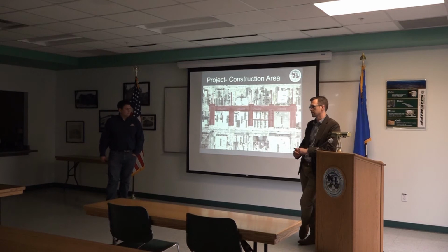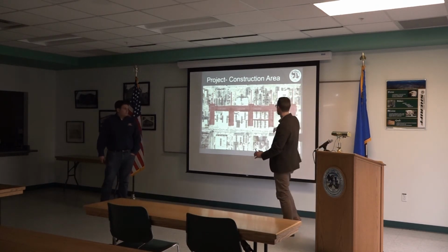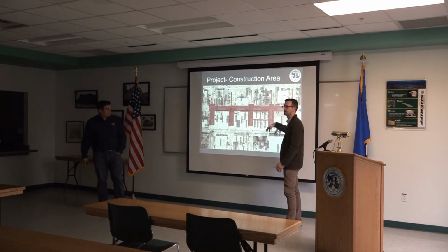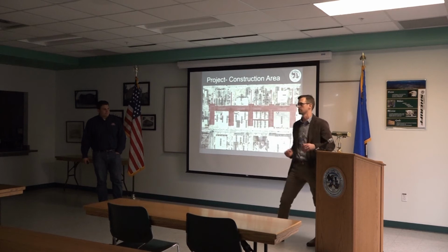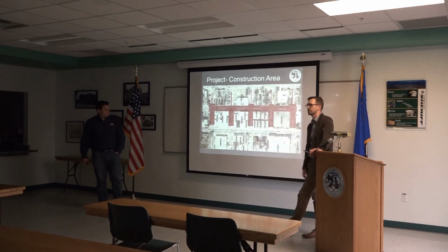Yeah, no, I understand the concerns. I believe back in the DBA meeting, we were thinking August at that point. And as I said, the scope has kind of changed in the sense that these streets are in pretty bad shape, so we had some funding opportunities to improve those streets. And with those streets, we wanted to do the utility improvements as well. So the scope changed a little bit at that point, and that expanded the schedule somewhat as well.